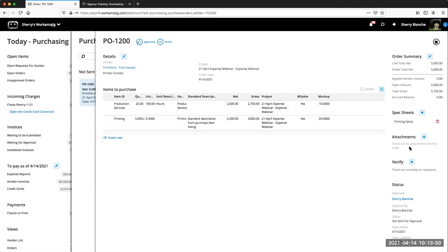Now you can manually create orders as well. But this is what we like to show because often you are budgeting and approving those budgets. So it's just quick and easy to just create them from the approved estimate. But yes, this one is the one vendor that it just added each line for the items that I'm purchasing, and it just automated that order, one per vendor.